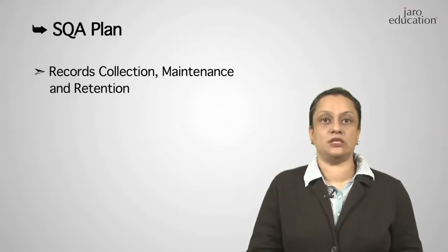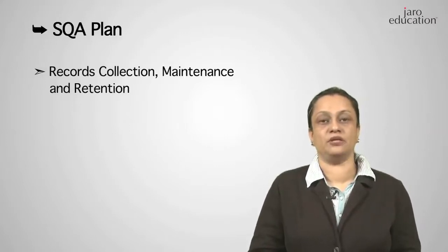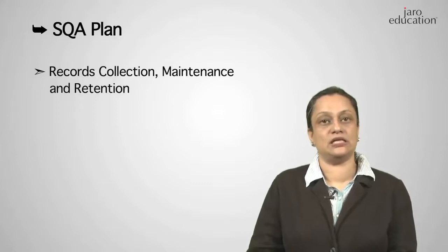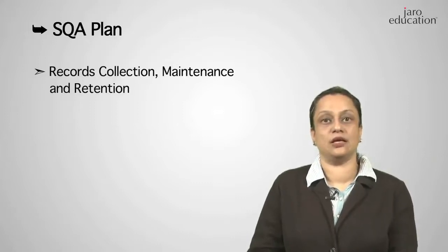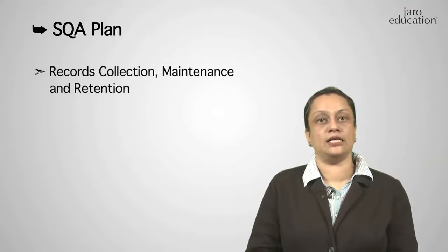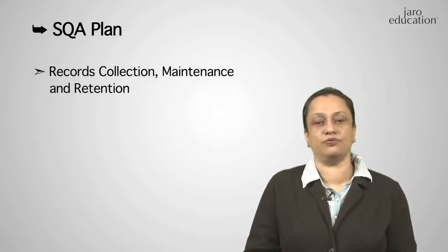If there is no maintenance phase following the development phase, then what is the duration for which these records have to be retained, and if they have to be purged, based on what conditions they should be purged, all this will form part of the plan. This documentation, record collection, etc. is addressed in the current version of ISO, ISO 9001:2000, and clauses 4.2.3 and 4.2.4 address these issues.